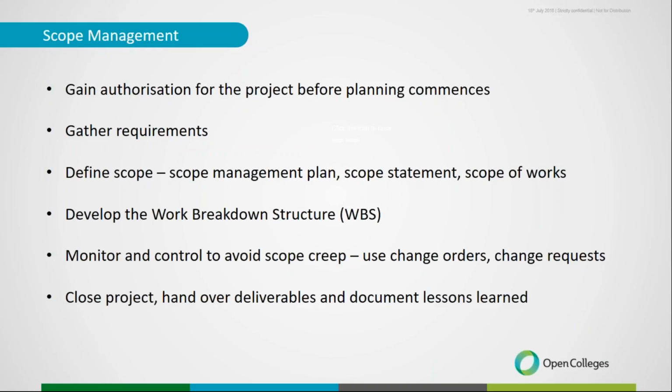and the purpose of it is so that you capture everything in it and you're able to then work out your estimates for how long it's going to take, what it's going to need, what the budget's going to be, what resources you're going to need. Do you need to procure anything for this particular work package, etc. So it forms the foundation of everything else in the project. You get it wrong at the beginning here, you will end up finding it very easy to go over budget and over schedule, etc. later on.